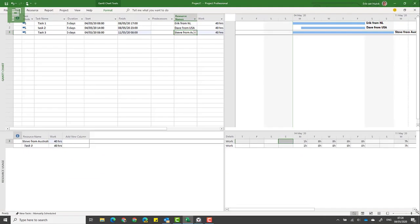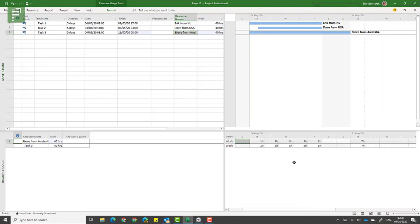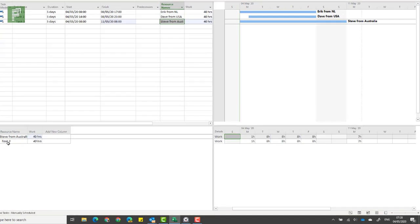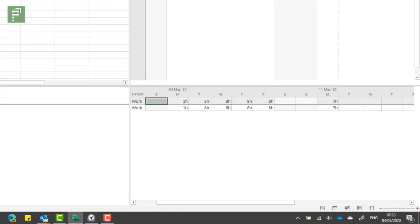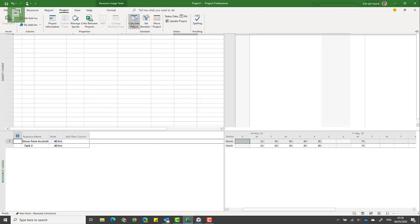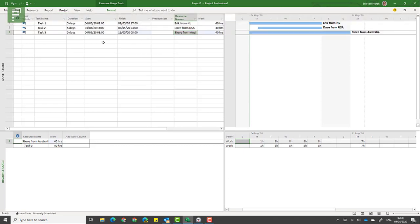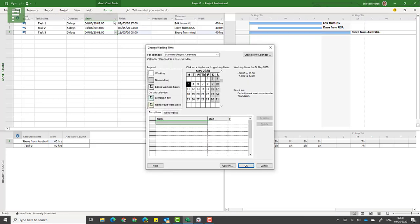We can show that by just looking at the resource usage view. Here we see that Steve has task three and he starts on Monday but just has one hour of work, and that might be that one single hour that he still works on that Monday.